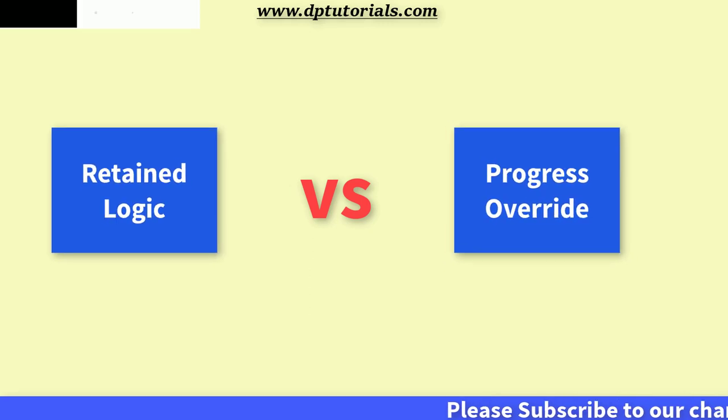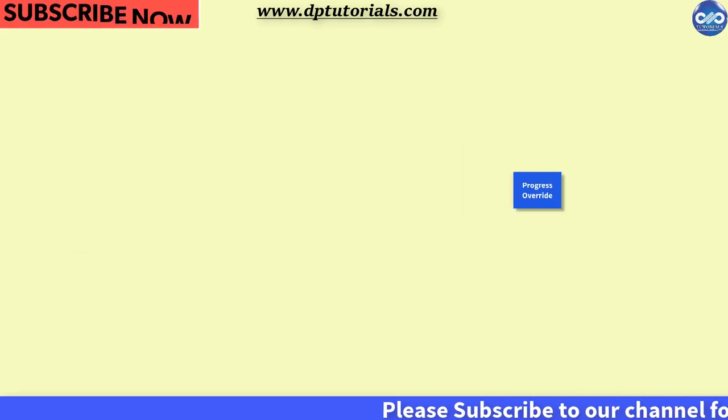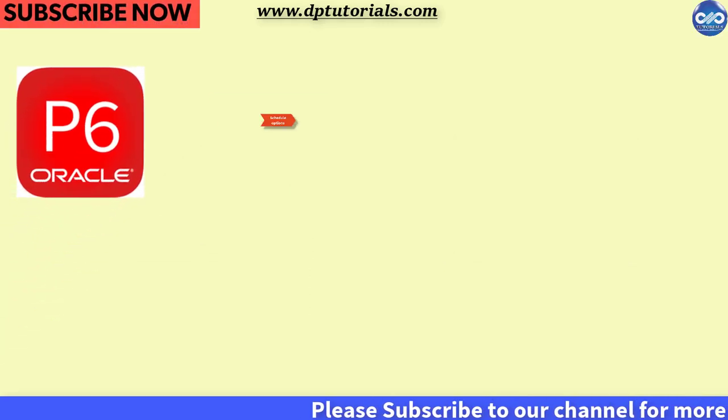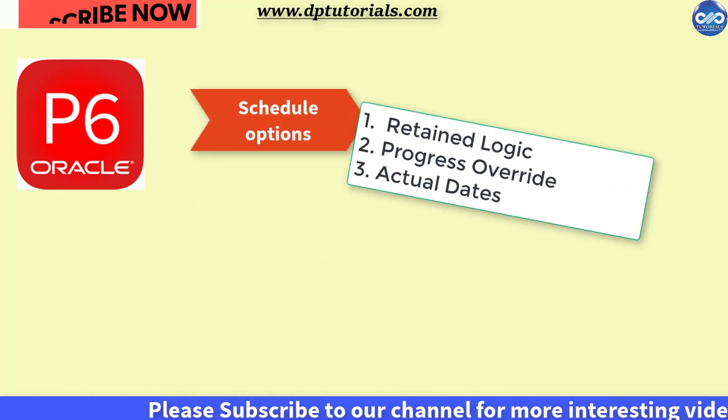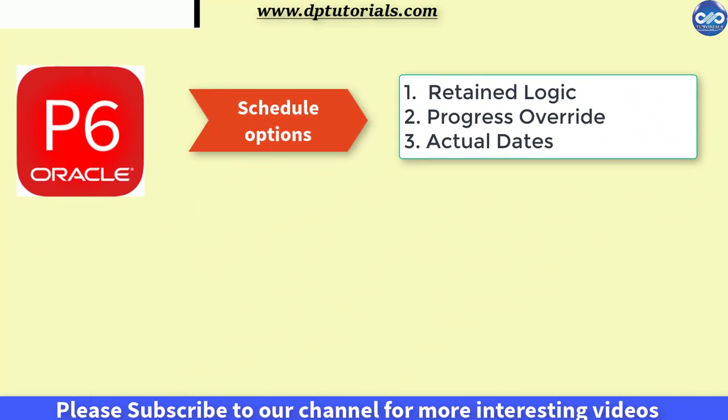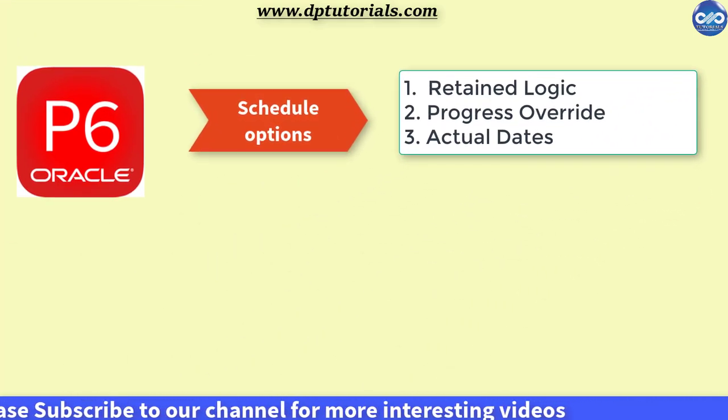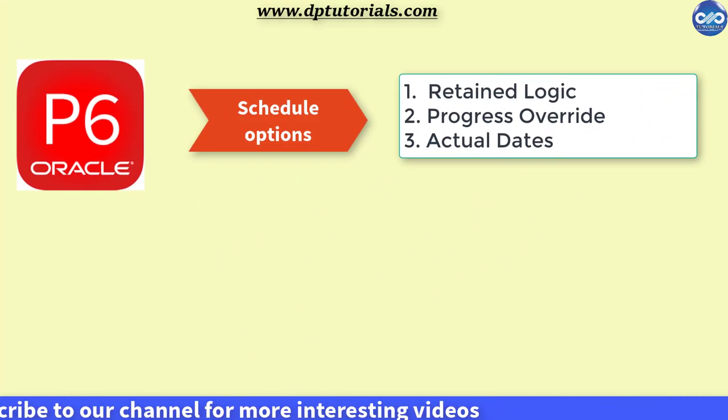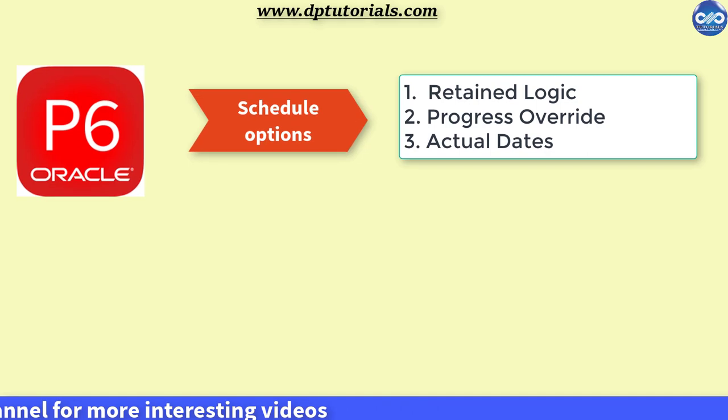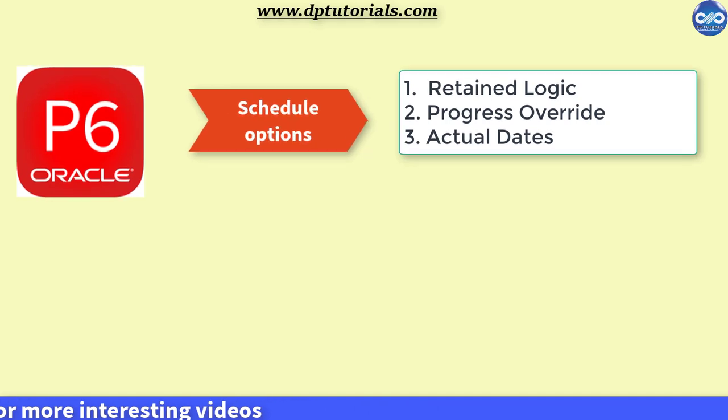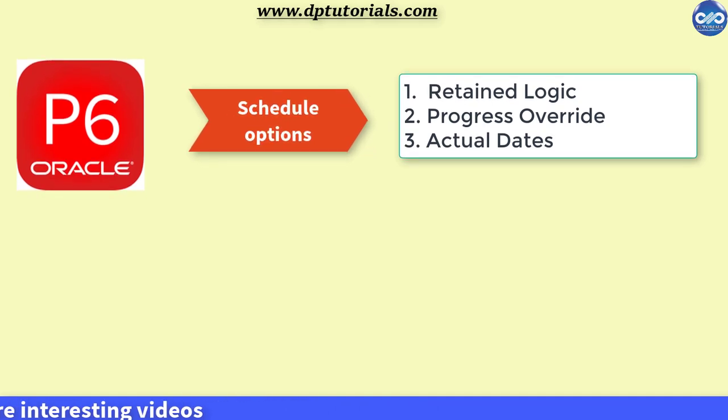In Oracle Primavera P6 Schedule Options, DialogBox enables users to select between Retained Logic and Progress Override and Actual Dates to Schedule Activities.